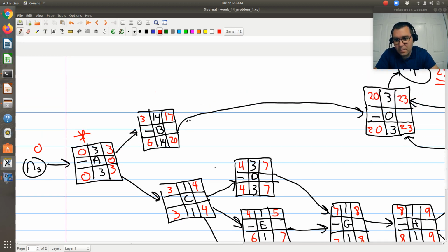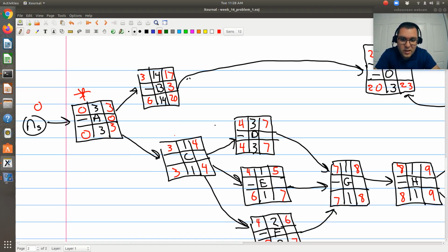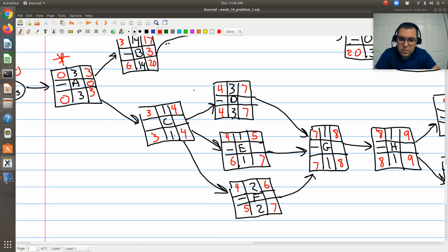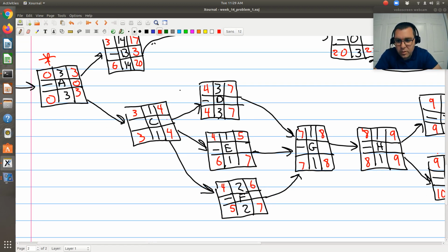Okay, so if I start at B, earliest possible starting time is day 3, the latest is day 6. So we have a float of 3. Okay, so if activity B begins anywhere in this window of day 3 to day 6, the project can be completed on time, so it's not critical. Okay, now I'm going to go through in alphabetical order.